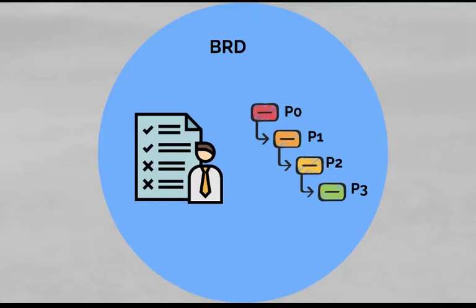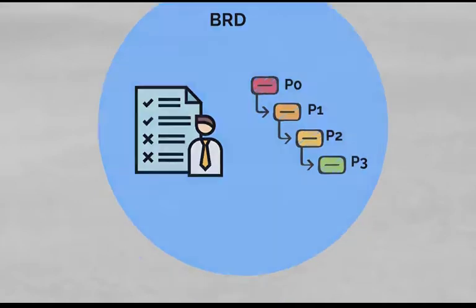The second tip is categorizing user stories with priority ranks, such as P0, P1, P2, and outlining the minimum viable product for launch. This helps the tech teams to plan the development accordingly. The third tip is keeping a glossary section with information on any used abbreviations and terminologies. The fourth tip is including wireframes and any diagrams wherever applicable for tech teams to visualize the product. Last but not the least, including a summary section of the overall product interaction to set the stage really helps.